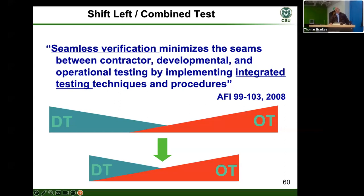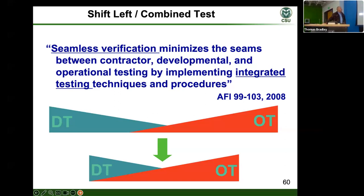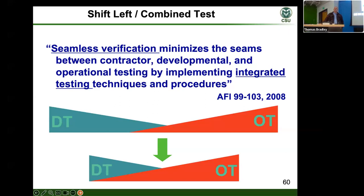What this looks like is doing DT and OT in parallel rather than sequentially. About a third of my units were doing the old sequential paradigm and two-thirds were integrating in parallel. The success rate in the parallel approach was three times better. This seems elementary but doing it within actual hardware/software on massive programs — where developmental test happens in one part of the country and operational test in another, and they don't talk — is just problematic.